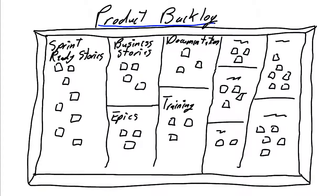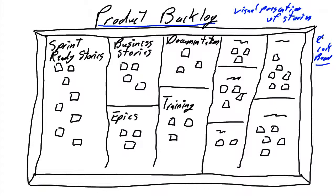As the user stories are produced, they're added to the product backlog. The product backlog is a visual presentation of stories — often a wall in your workspace or, as I've tried to draw here, a corkboard where the stories are placed. As stories are completed, they move through the board. The key difference between a first-identified business story and a sprint-ready business story is that by the time it goes over to sprint ready, every aspect of the story — all three pieces — are filled in. Often we only have the 'as a warehouse clerk' part without the definition of done or the prioritization, and that differentiates the right-hand side of the product backlog from the sprint-ready column on the far left.